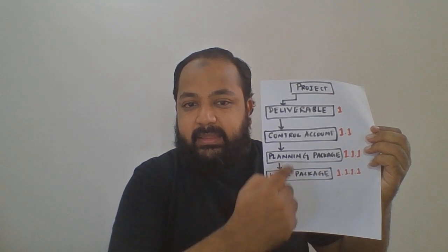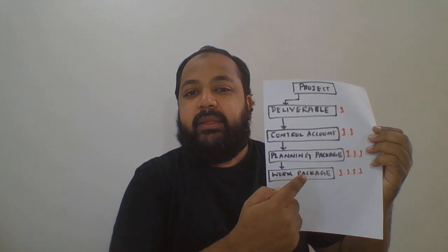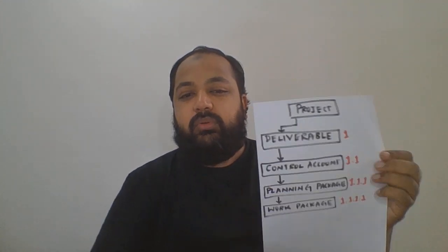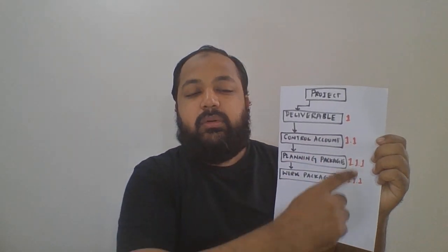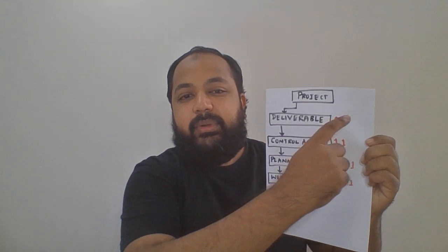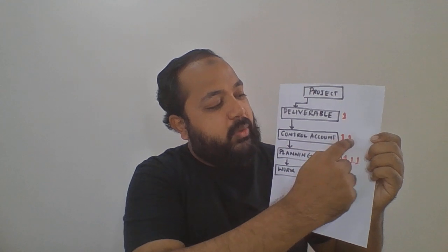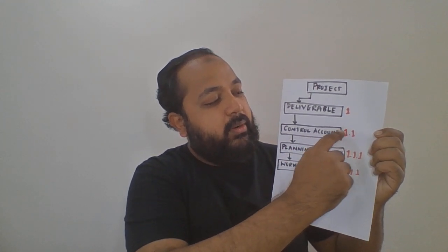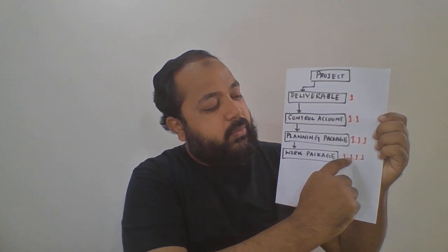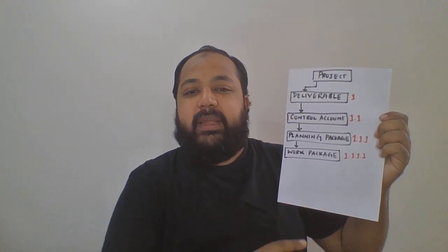If you can start tracking this efficiently, you can start getting things done. Okay, this could also look like, one more point over here. What are these numbers? These are called code identifiers. WBS code identifiers. Breakdown 1.1. If you have more activities, 1.1.1, 1.1.2, it breaks down as you go. Last level is over here. If you have, like, 4 work packages, 1.1.1.4, 4 work packages will be there.